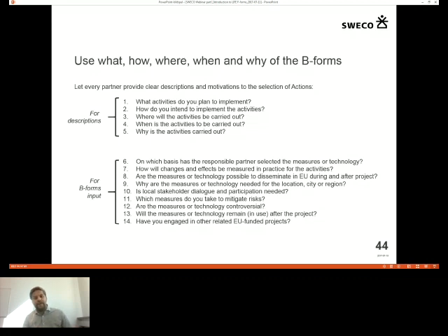On the other hand, and I will get back to that in implementation, perhaps it's better to use sub actions so that you create, for example, C1. First of all, you explain the overall setting. And then C1A could be, for example, the procurement of different contracts. C1B would be the installation of them. We'll get back to this, but I would say there is no general practice.